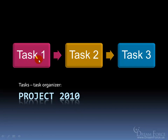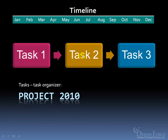This makes sense because if I haven't researched anything in task 1, then I have nothing to write about in task 2. Now the tasks are usually tracked on a timeline, where each task is allotted so much time — like hours, days, weeks, or months — to be completed. And if one task takes longer than the set time, it may push our project out and extend it beyond its due date and of course be late. Now each task is going to require some resources, and there are three types of resources.